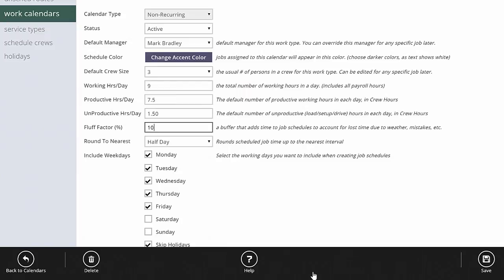Fluff factor allows you to add a percentage buffer to your schedule — in this case ten percent. It takes the man hours on the job and adds ten percent to build in a buffer for mistakes, weather problems, and equipment problems. It still holds crews accountable to the man hours in the estimate, but on the schedule you'll have a ten percent buffer. Without a buffer your schedule would constantly run into problems. With ten percent fluff factor, basically one day every two weeks is added as buffer time to absorb issues so your schedule isn't constantly off.